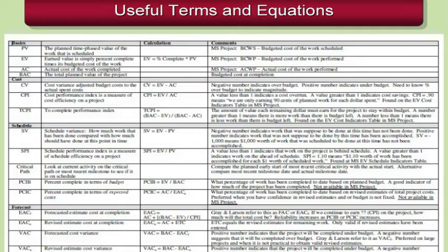Again, I want to pay specific attention to the planned value because we throw around two different terms for PV. We have the planned value for the complete activity and the planned value for the overall budget, but this particular PV is always, always, always just that amount of duration of that activity and the cost for the duration to date. So just be careful when you're using PV in the equation that you're using the right PV. I tend to call this PVA versus PVT, which is the total planned value for an activity. I've tried to distinguish between the two.